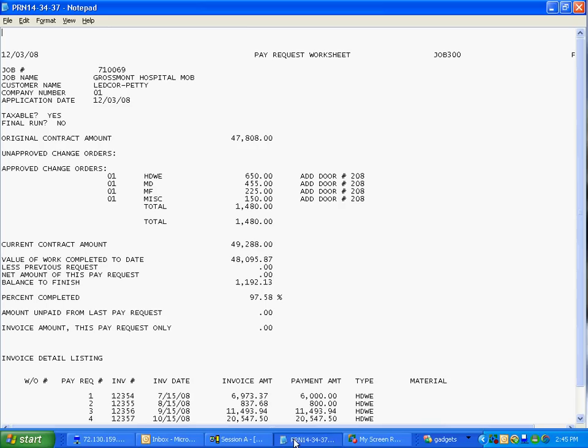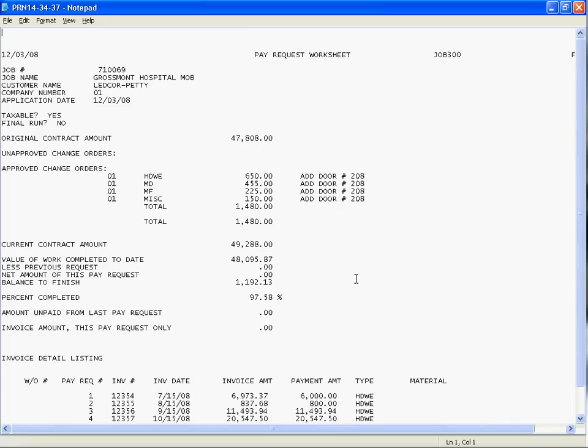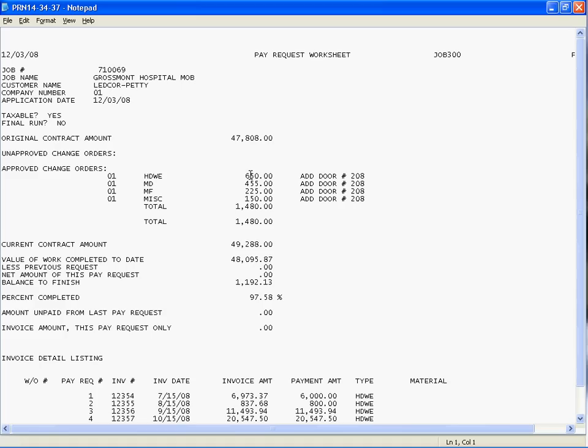Let me just show you very quickly. I've got it printed out. This is the pay request worksheet that the system generates automatically. You'll see that it shows all the header information—whether it's taxable or whether it's the final run. It shows the original contract value, lists the approved change orders by those items and their sell amount and total, and gives you a revised contract value on the job.